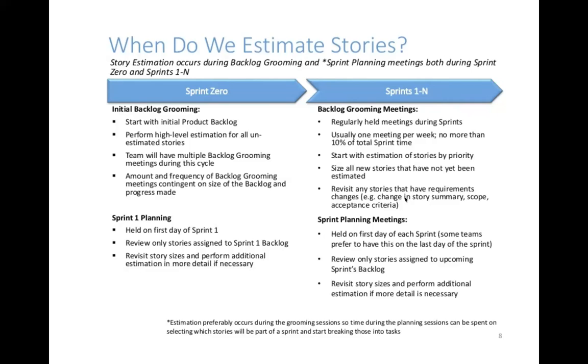Then when we come to sprint planning, the team, from the grooming day to the planning meeting, can work together collaboratively to understand what they have to deliver. They think about the delivery perspective, how much time they have to spend on development of this feature. And they can use techniques like the poker game or maybe some bucket sizing games. Through that, they can provide their estimations.